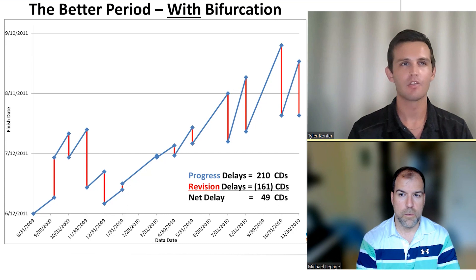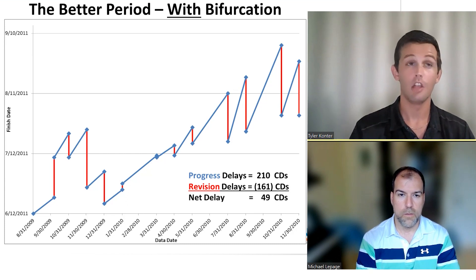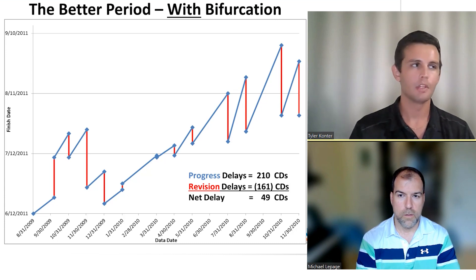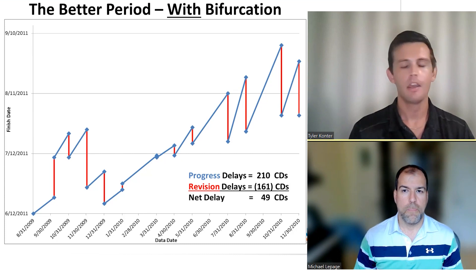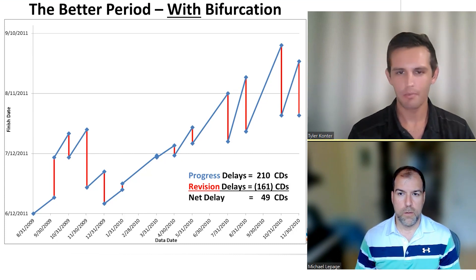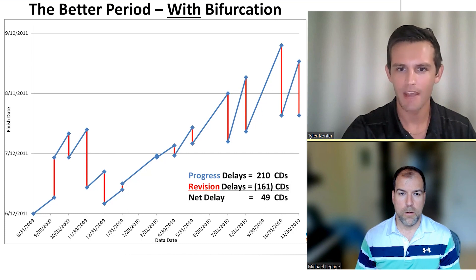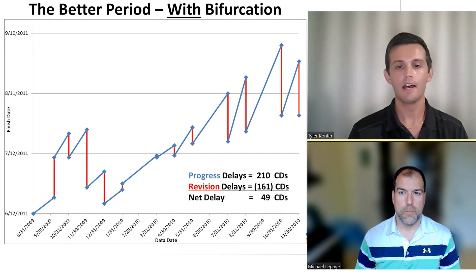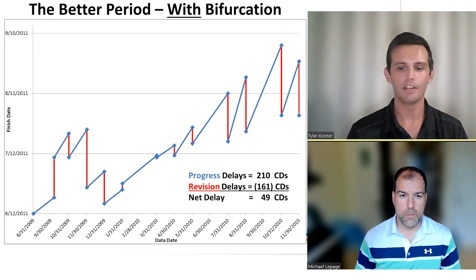Those revisions involve taking activities and shortening their durations in the future, looking at our logic — perhaps changes in logic — taking activities that were formerly sequential and making them concurrent, reducing lags, and adjusting forecasted activities along our critical path. Ultimately, we went through that same process. Those red lines are now bringing back our progress delays. We forecasted that we were going to mitigate 161 calendar days of our 210 calendar days of progress delay, and that's how we ended up with our net delay of 49 calendar days.